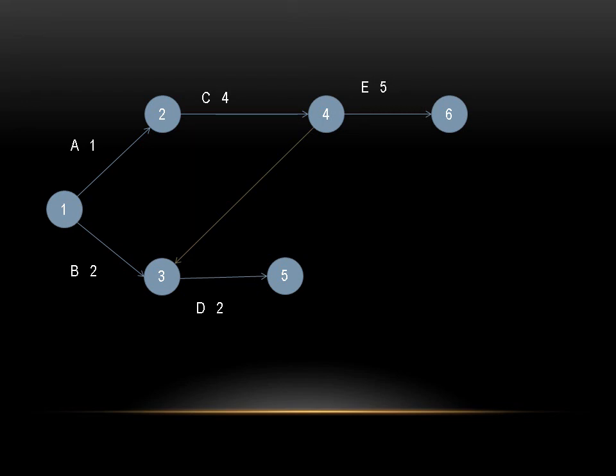Okay, then E was preceded by C, and again F is preceded by E and D. F is preceded by E and D. I have given the arrow towards this, but the arrow is not towards D. Why? Because Z was only preceded by D.